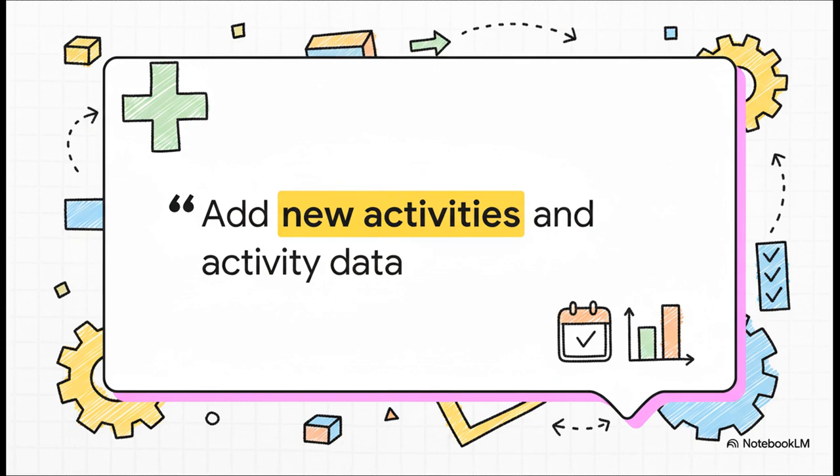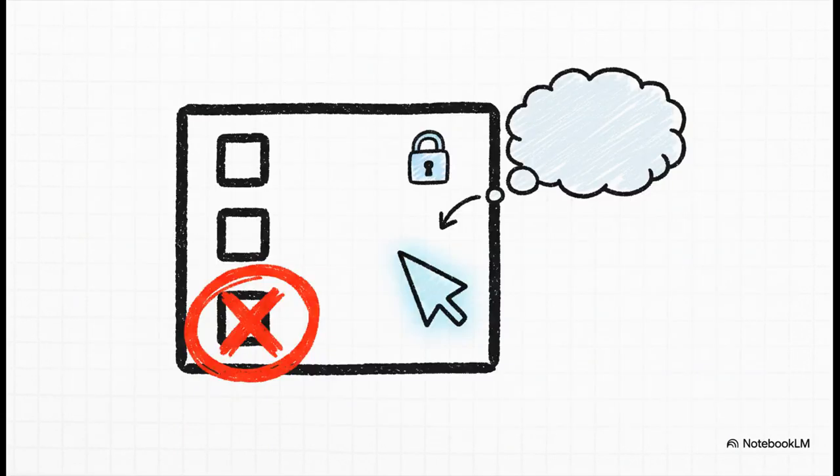Checking this box is you telling Primavera, hey, go look at my current schedule, find any activities that aren't in the baseline yet, and pull them in. This is literally how you get your new scope reflected in the baseline. Now, this next part is just as critical.